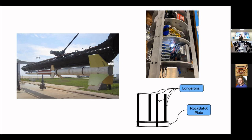So we start with brainstorming. We present a conceptual design review, typically in about early October. We work through a preliminary design review in November, and then the fall semester gets rounded out with a critical design review. They typically get pretty long. 99% system definition is what we're looking for. And what we're looking for with that is to prove to Wallops and Colorado that the design is mature enough to move into the manufacturing phase.